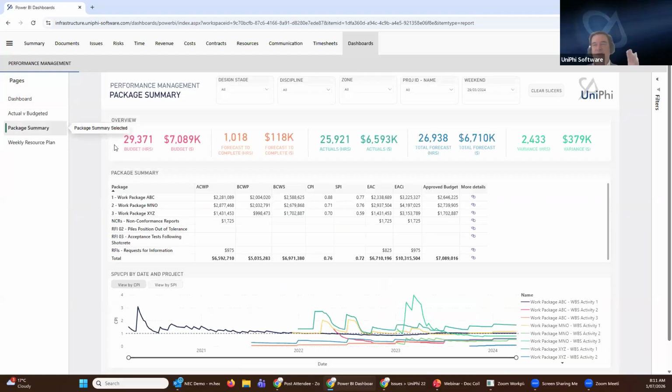So I looked at the portfolio dimension. I'm now looking at the program dimension. And in the program dimension, I've got work packages that are running, and they have these earned value statistics here, which again is a combination of time and cost against a scope, the scope being these work packages. So actual cost, earned value progress against that, and scheduled costs gives me those two elements of actuals versus schedule and performance. They then have their own performance indexes here.